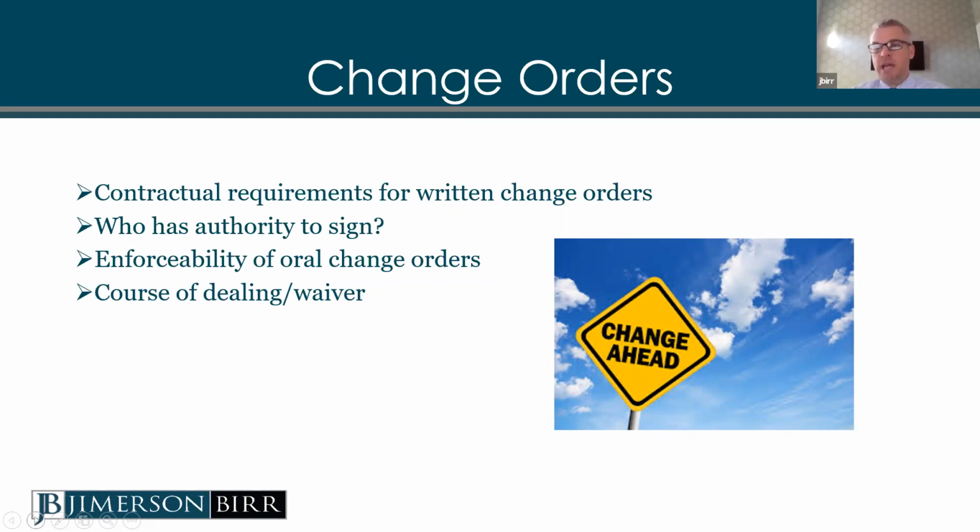Most contracts will say that for those change orders, there's a process that you have to follow. So just make sure that you understand what that process is. And if you can't follow it for whatever reason, you need to have something in your file going to the party who's authorizing the change order, memorializing that agreement. Because in the world that I live in, if you don't have that, then it's a he said, she said situation, and that's where it gets expensive in litigation.